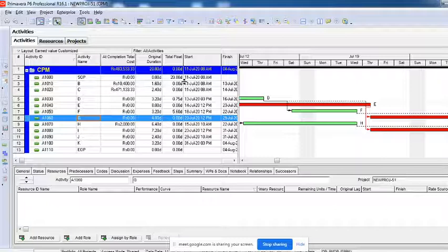We have estimated the activities, starting from creating the EPS, creating a project, creating the calendars, then breaking down and creating the WBS, and then creating the activities, giving the relationships based upon the dependencies, assigning the durations, creating the resources, assigning the roles and resources, and now filtering and grouping the way we want to execute and monitor it tomorrow. So everything we have done till now is all planning.